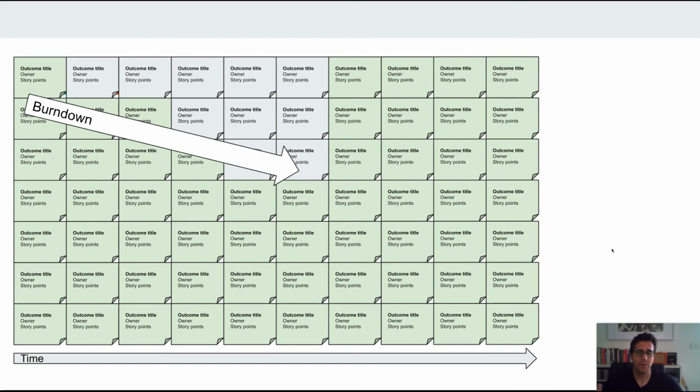Halfway through a sprint, I used to do this quite a lot in one particular position I was in. I'd be working on this. I go, I don't want to put this stress on the team. I'm going to go and have a look at this. I can see it's not quite working. I'm going to remove all resources from these bottom 4 things because we're not going to get them all done. And I'm going to redeploy those resources onto the things that are more important to us, because we're not going to complete the top priority stuff.